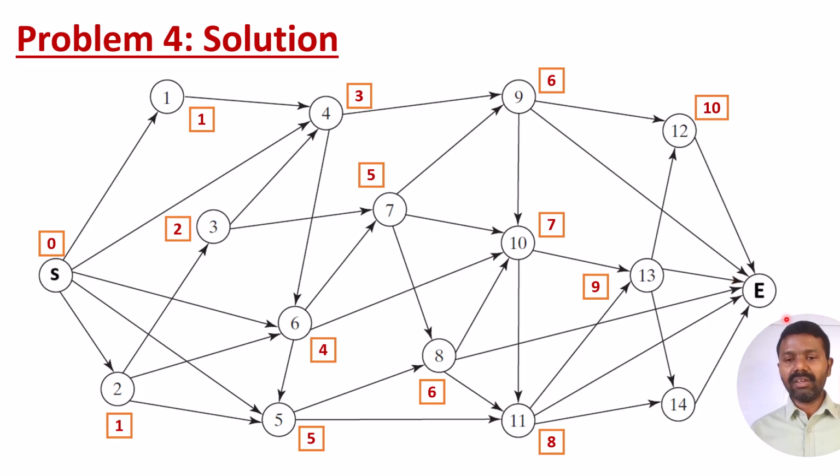And again if you go to the, no, one more is there, one more 14. So if you come from 11th to 14, it will take the 9, but if you come to this path, 9 plus 1, 10. So finally you need to come to this E. If you come to any other path, it will be less than 10, but here in this way, 10 plus 1, it will be 11. Even in this path also, it will be 11 only. So the final will be 11.